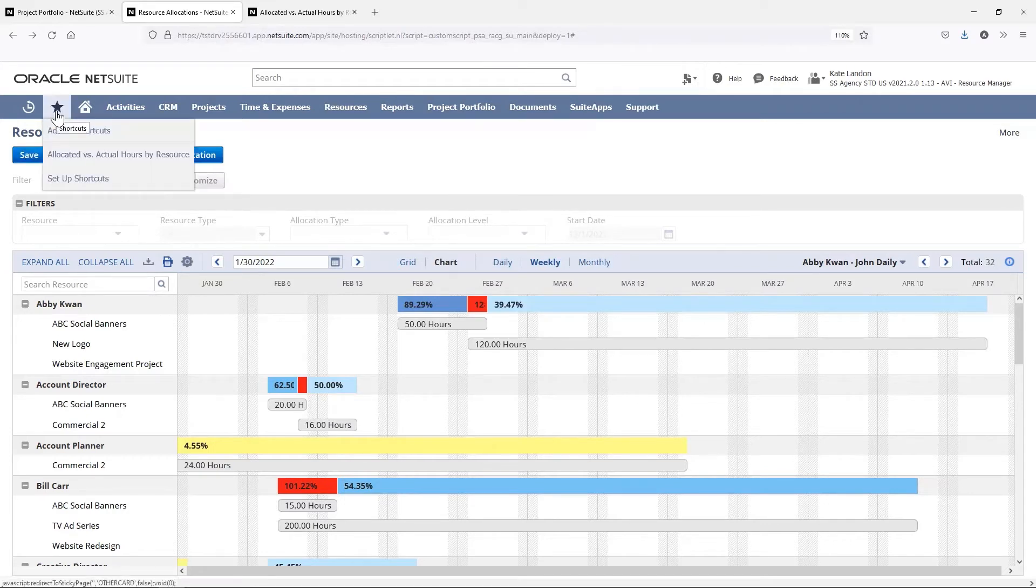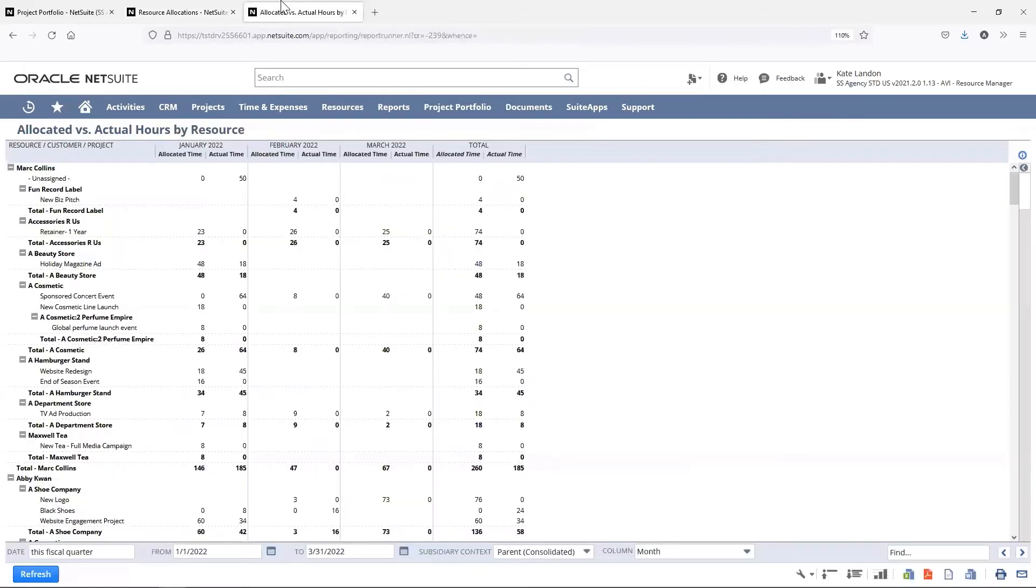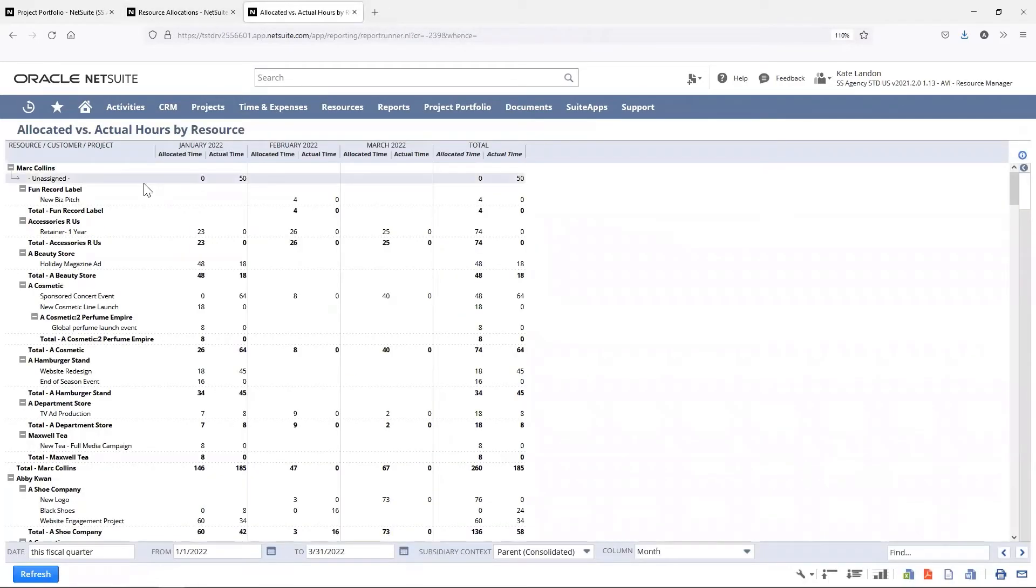Now, I'll utilize my favorites bar to look at an allocated versus actual hours by resource report. Here, we can see a list of available resources allocated versus actual hours by that resource.